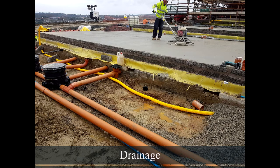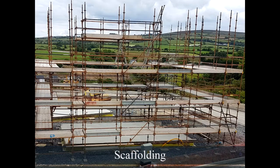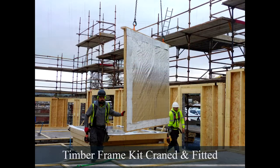After this, the curtilage stone surrounding the house is placed to approximately 500mm below the finished floor level, giving a secure foundation for the scaffolding to be erected. The scaffolding is then erected prior to the delivery of the timber frame kit. Once the timber frame kit is delivered to site, it can then be craned into position.